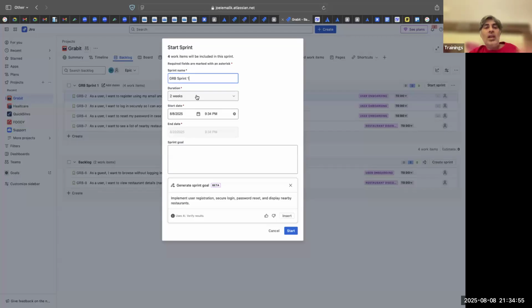In those cases, by development cycle, what I mean is development, testing, and then fixing bugs. You have to develop, then test, then fix the bugs, and then get a review done by the product owner. If all of these things take 15 days, then it could be a 3-week sprint.